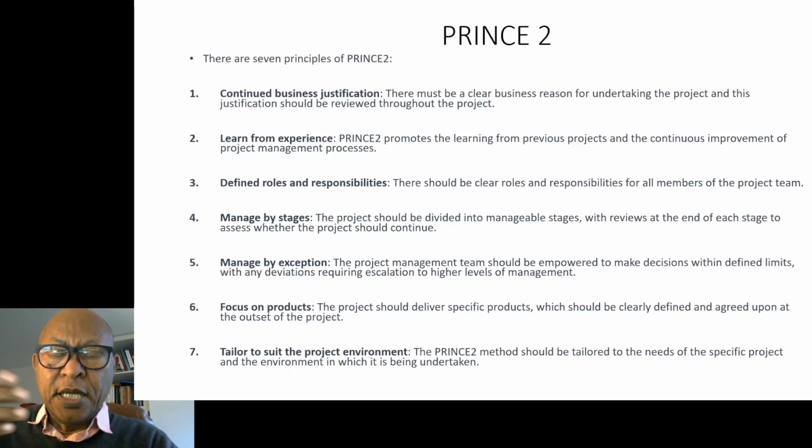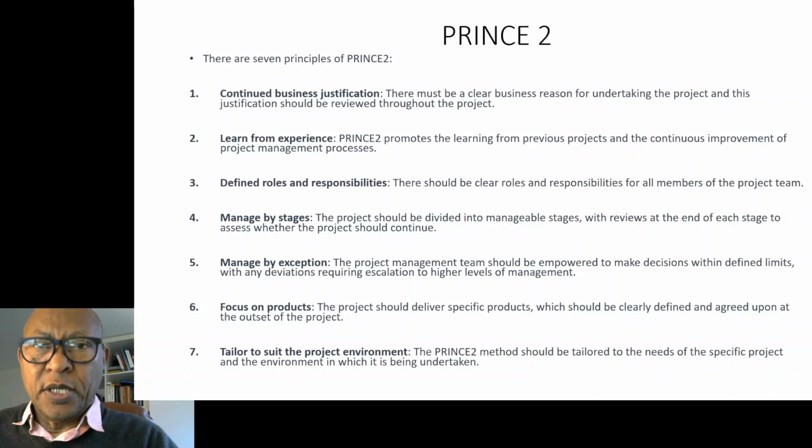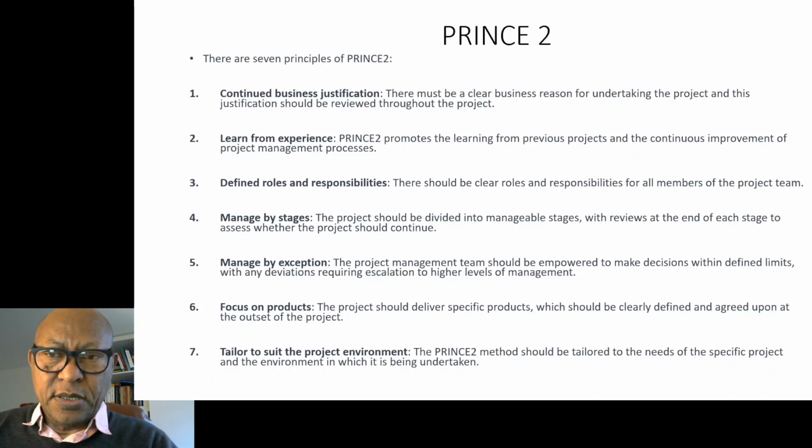What it means is that costs might not be in your control. You're buying staff, equipment, and the cost might be tripled. In that case, are your benefit and your cost still justifiable? Is the cost too high for the product you're producing? So you have to justify the continuation of the project based on the comparison between the benefit of the product and the cost to produce it.